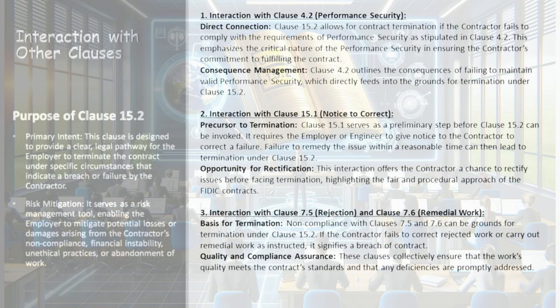In the context of Clause 15.2 in the FIDIC Yellow Book, its interactions with other clauses are pivotal for a holistic understanding of contract management. Interaction with Clause 4.2 — Performance Security: Clause 15.2 incorporates a provision for termination if the contractor fails to meet performance security requirements as set in Clause 4.2, underscoring the importance of performance security in guaranteeing the contractor's commitment. The implications of not maintaining valid performance security directly contribute to conditions that can initiate termination under Clause 15.2.